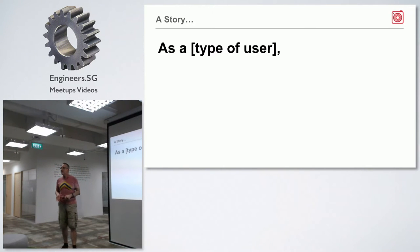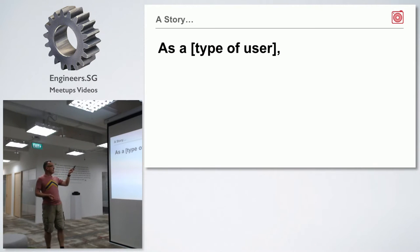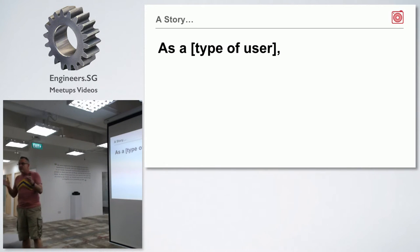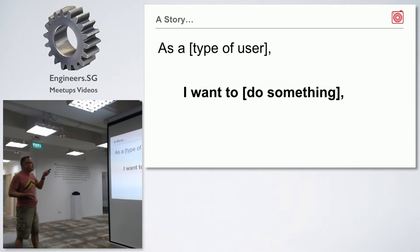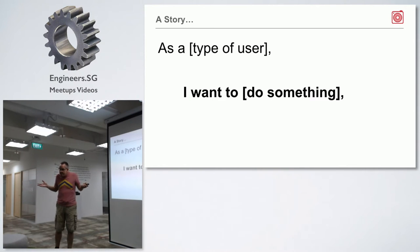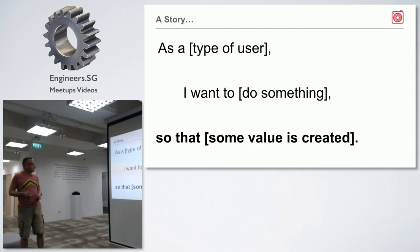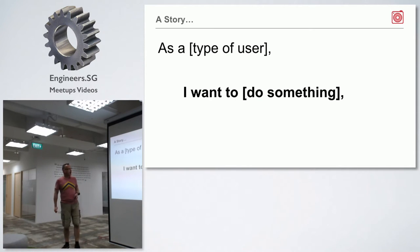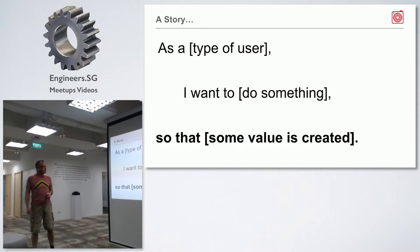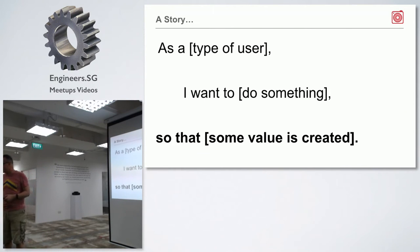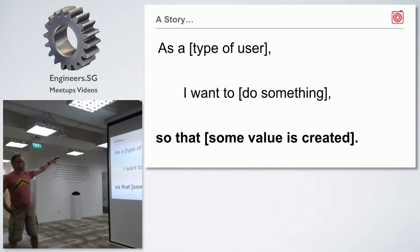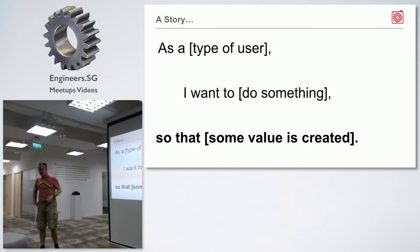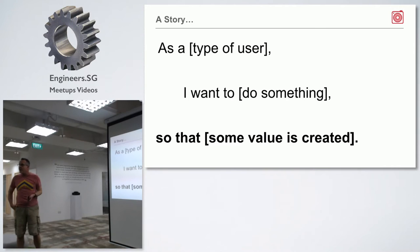A story has a very simple structure. There are three clauses: 'As a type of user,' 'I want to do something,' 'so that some value is created.' That is the heart of what you're doing as a software engineer, as a product team — figuring out how to create value for someone.